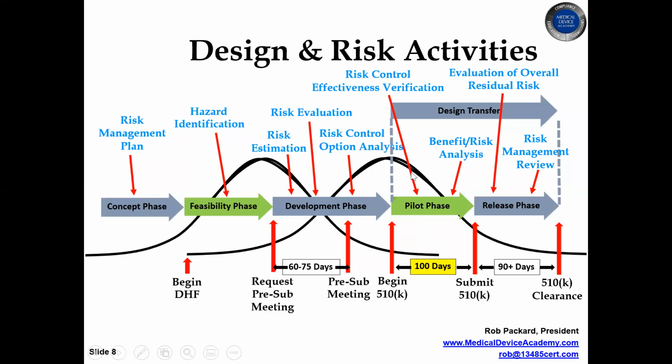So research and development. And usually a company will be doing research, and then they'll say, oh, we're done doing research and we're ready to launch our product. Well, some of that research was development. You were getting beyond the research phase, and you really needed to start documenting things as development as part of a design history file. Now, ideally, you would have started your DHF way back here when you approved a design plan. But if you didn't create a design plan and you decide way out here, oh, we're ready to go to market and we're ready to submit a 510K, well, now you have to document all that design work that you did retroactively and have possibly a retroactive design review.